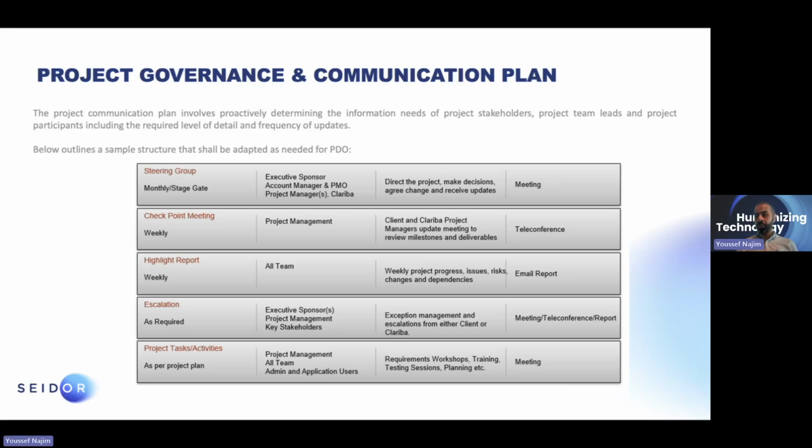We define with you a very clear project plan, initially a high-level initial project plan, and then we define the milestones of delivery so that any sign-off that is done with you, which is very important for you as an organization, is very clear, based on clear deliverables and clear milestones.